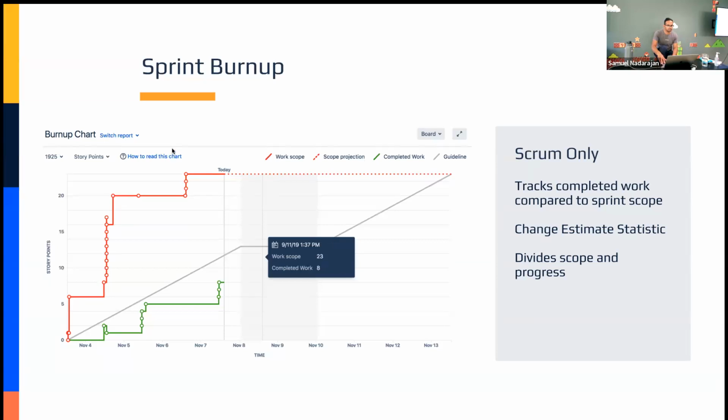Say you're in a sprint and the size of the sprint keeps changing, and you want to illustrate how that's causing an issue reaching completion, because tickets keep expanding, or we re-point in the middle of a sprint, hopefully nobody does. I'm just trying to think of the occurrences which would cause the max scope to increase. Either more tickets get pulled in, or certain ones get re-pointed too late. It illustrates that since we started the sprint, this is how much our target changed.